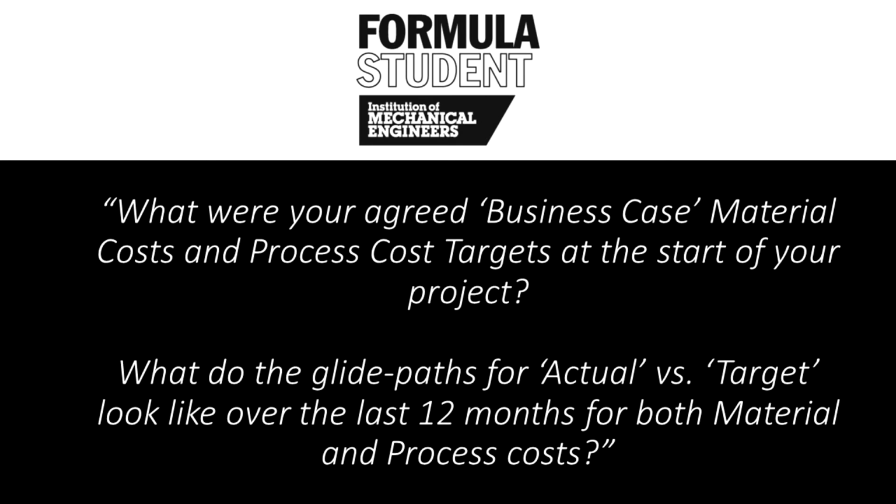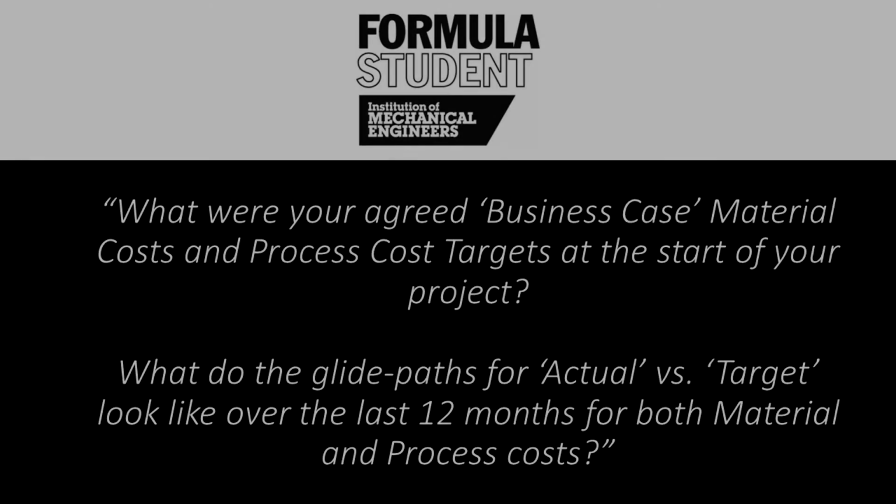What were your agreed business case material costs and process cost targets at the start of your project? What do the glide paths for actual versus target look like over the last 12 months for both material and process costs? The cost report, I think, is a useful way of demonstrating that you understood cost.